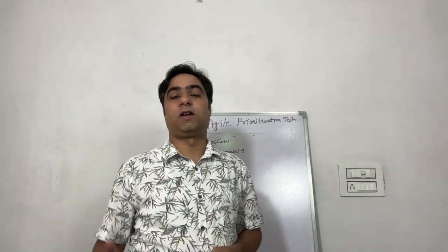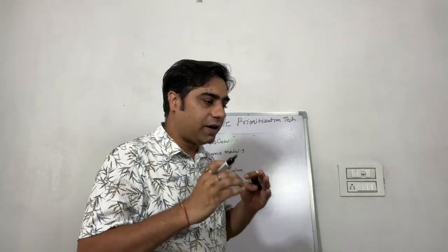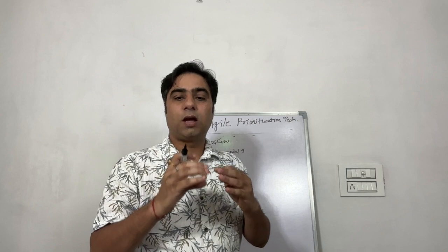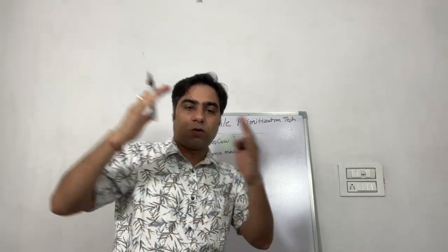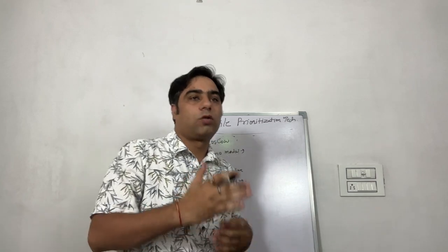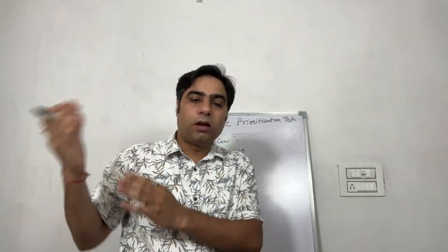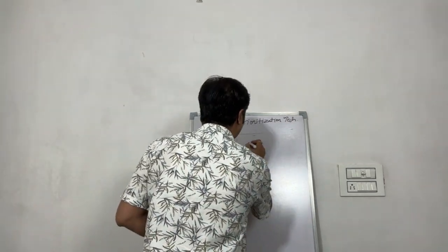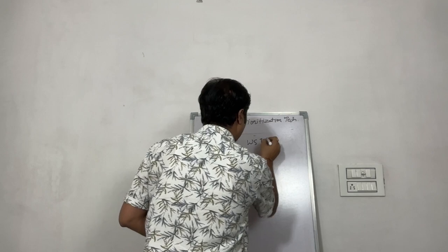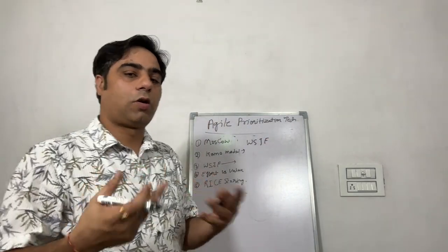shortest job first. Weighted shortest job first means whichever has the highest weight, or you can say that adds more value to your customer on the basis of your cost of delay. And we will discuss cost of delay. So now let's discuss WSJF. WSJF is about scoring your product item or product backlog item.